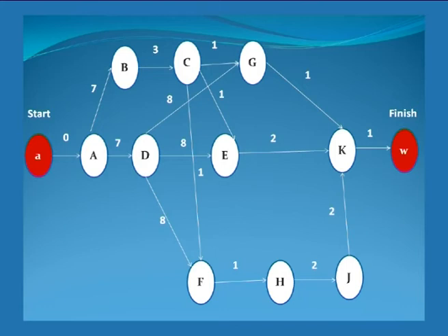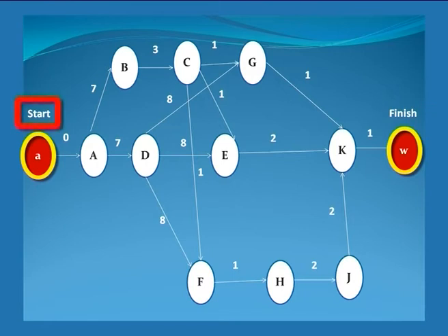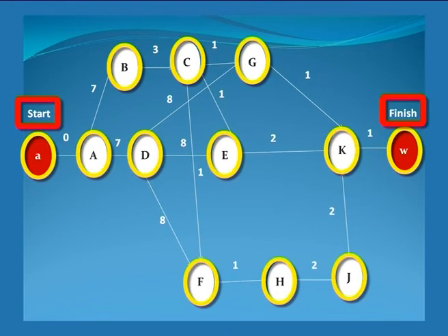In this representation, the tasks are the vertices of the graph. The length of each task is the duration of the corresponding task. The start and finish of a task are two stages of the project. We can define an initial stage as start and a final stage as finish, and a certain number of intermediate stages. Each stage is defined by tasks already carried out. The beginning milestone of the project is the start stage. The start is followed by task A, which is carried out in 7 weeks.